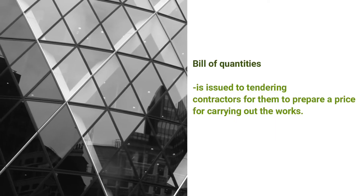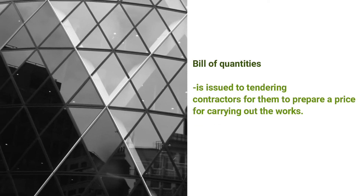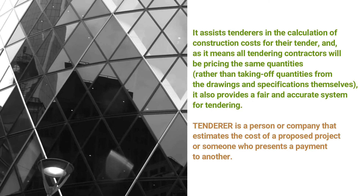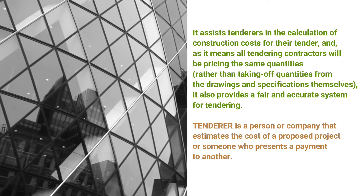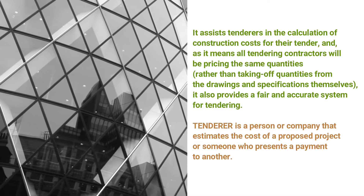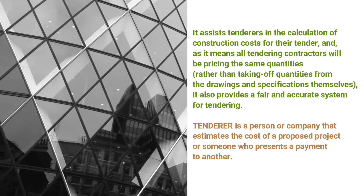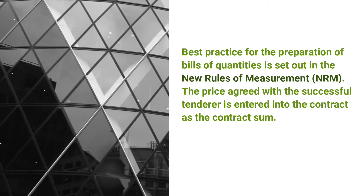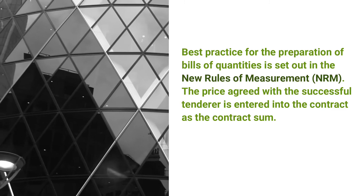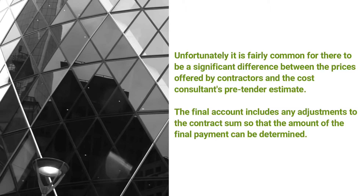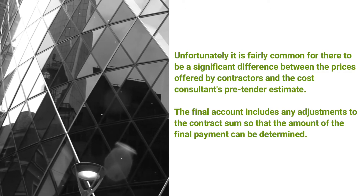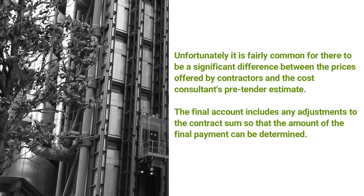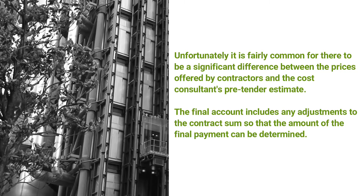A bill of quantities is issued to tendering contractors for them to prepare a price for carrying out the works. The bill of quantities assists tenderers in the calculation of construction costs for their tender, and as it means all tendering contractors will be pricing the same quantities rather than taking off quantities from the drawings and specification themselves, it also provides a fair and accurate system for tendering. Best practice for the preparation of bills of quantities is set out in the New Rules of Measurement. The price agreed with a successful tenderer is entered into the contract as the contract sum. Unfortunately, it is fairly common for there to be a significant difference between the prices offered by contractors and the cost consultant's pre-tender estimate. The final account includes any adjustments to the contract sum so that the amount of the final payment can be determined.